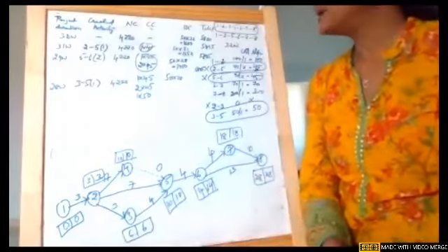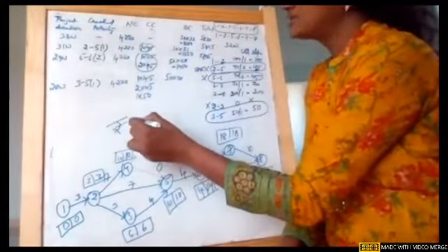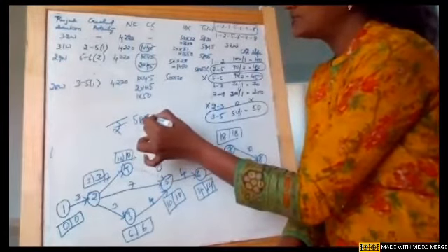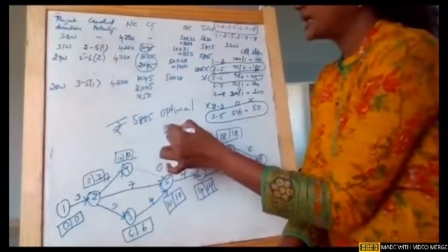So you can write that particular cost. The optimal duration is 28 weeks with a cost of rupees 5,085. With the optimal duration of 28 weeks, here you can stop crashing.